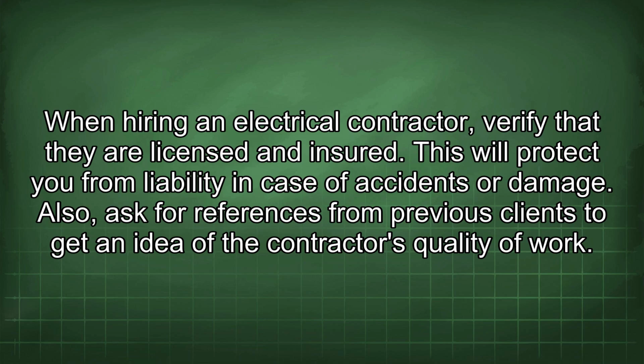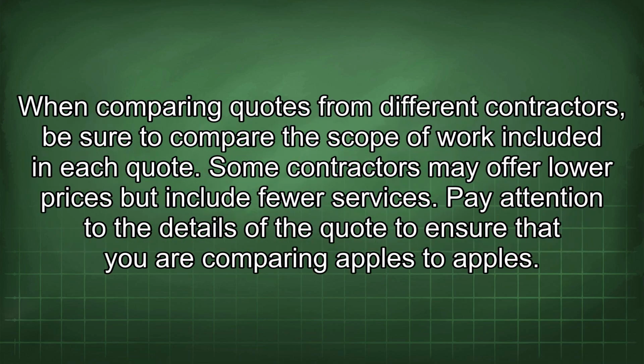When hiring an electrical contractor, verify that they are licensed and insured. This will protect you from liability in case of accidents or damage. Also, ask for references from previous clients to get an idea of the contractor's quality of work. When comparing quotes from different contractors, be sure to compare the scope of work included in each quote. Some contractors may offer lower prices but include fewer services. Pay attention to the details of the quote to ensure that you are comparing apples to apples.